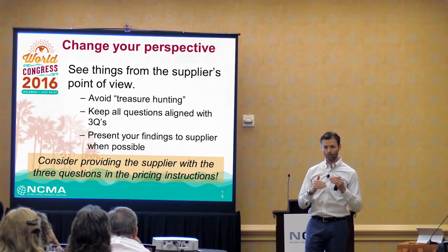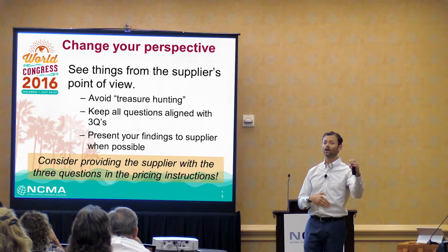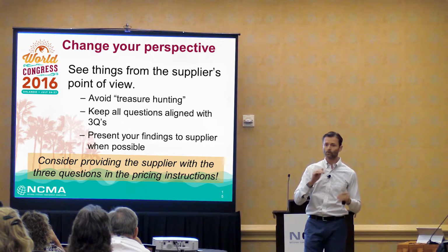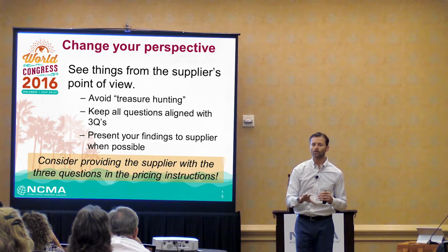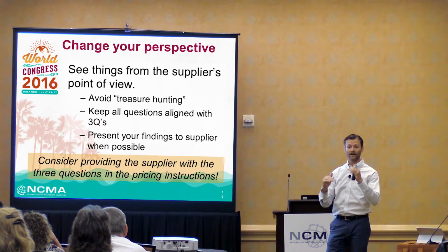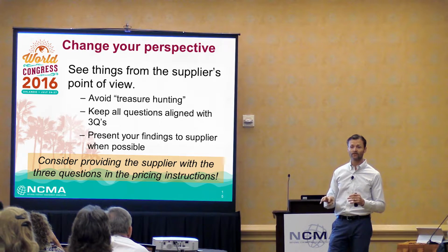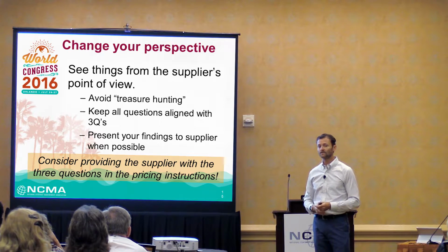But I would say, and I'm going to show you the template that we use, that fact find, or the RFI form. If I can't do phone, I can't do in person, and it's going to be email, what we've had the most luck with is setting out this fact find RFI form. We go through the entire proposal, and we look at what we have BOEs for and what we don't, and we do everything all at once and give that whole form to them. Now we've got a WBS layout that we can build over time, and we can ask questions that are nested in with other questions, and it becomes a very structured approach that both of us can look at and give feedback on. Does that answer your question?